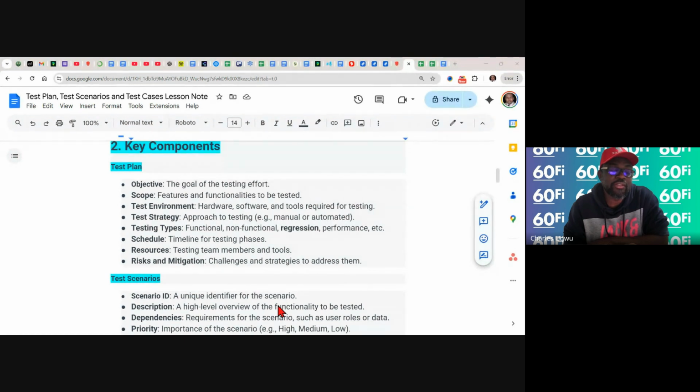And we even invited our stakeholders, even the CEO is coming. Is that not a big challenge for us? We didn't prepare anyone else to come and carry out this testing. That is a big risk. So what we mean is that in a situation like this, we need to have like 2 or 3 team members who are going to train. We're going to have like 3 testers available. So these are some of the things happening to some of you here in your team. You don't take things seriously, but things you don't take seriously here might be things that might cost you a job.